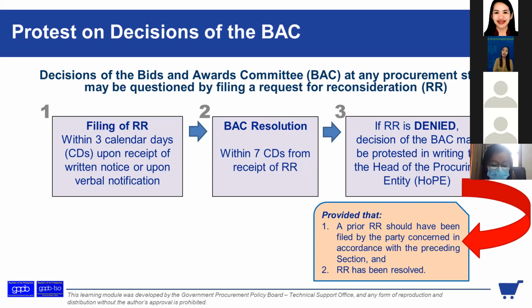If Thursday, kahapon yan, nangyari, Friday, Saturday, Sunday, magpo-fall sa Sunday. But since wala tayong government office sa Sunday, bali, yung next working day, dun na yung deadline. Hindi morning, whole day pa rin. Sabihin kasi Sunday nga yung deadline yan eh. When you say office calendar days, it includes up to the last day that you are open. Wala din sinabi na hanggang 11:59 ng gabi. Kasi wala na ding office. It's not reasonable for us to wait for them until 11:59.